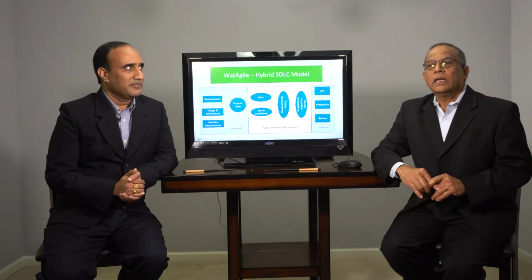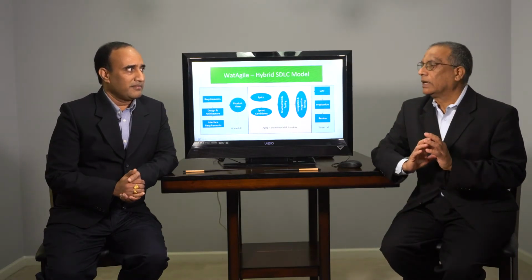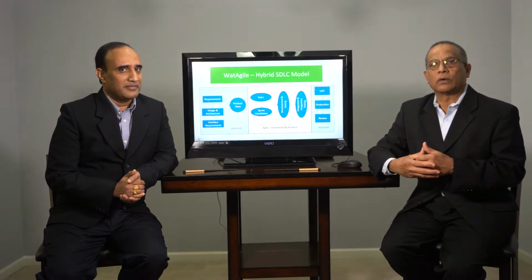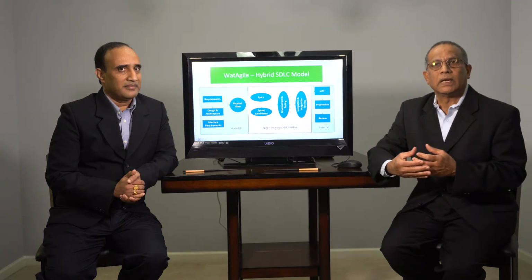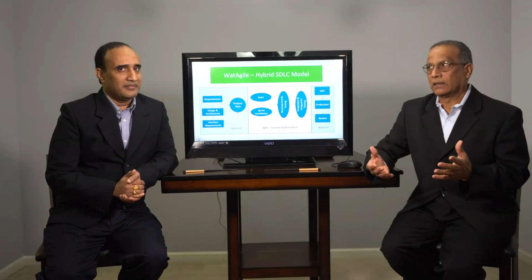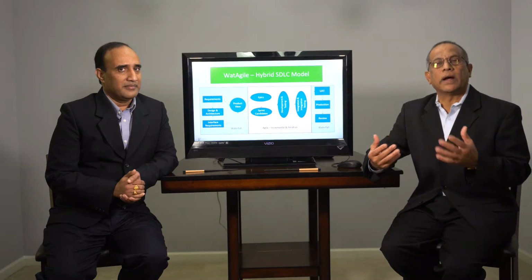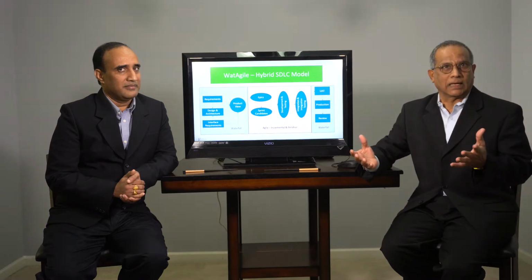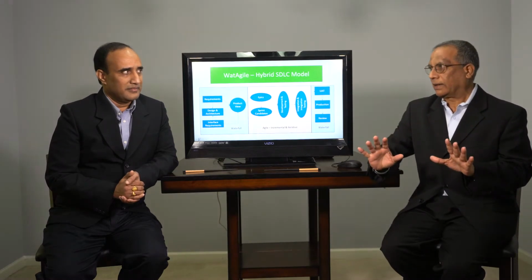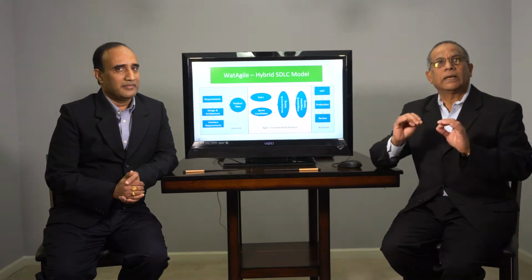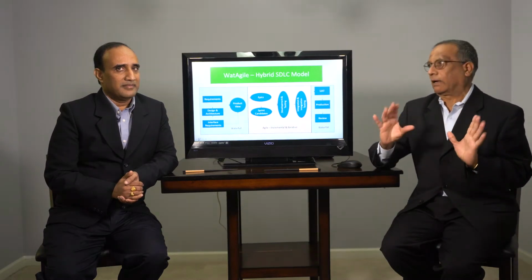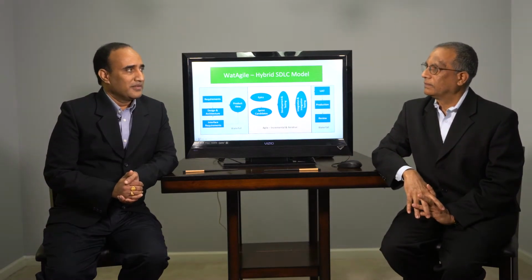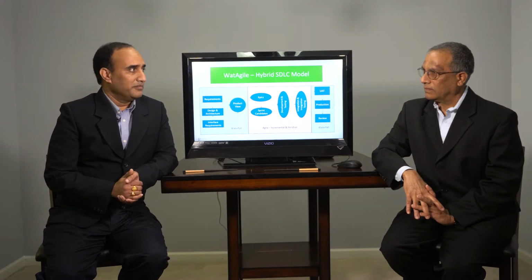Yeah. Initially, you will have the basic requirements. Once you get the basic requirements, your architect or analysts are going to review those basic requirements and see what needs to be done, right? So at that stage, you're going to identify where the data is going to come from and how to manage the data and things like that. That is the main important thing. So the criteria here is the interfaces. That's how the project size is going to be defined. Okay. So how do you customize the process based on the size?